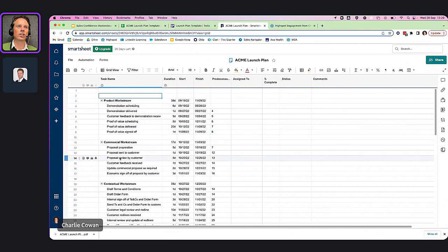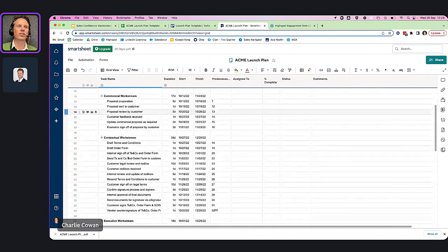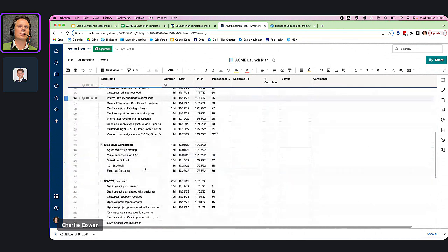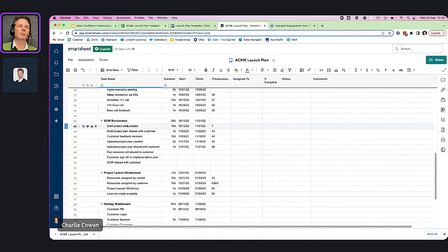And at first look, it's pretty similar to a spreadsheet. Here I've got all my different work streams. That's good. I've broken it all down by the atomic level of what needs to happen. The main difference here is that we've got 2 new columns, the duration and a predecessor. So if I go down here to this SOW work stream, I've left a few that I've not filled out here. So the SOW work stream, so this is pre-sales.